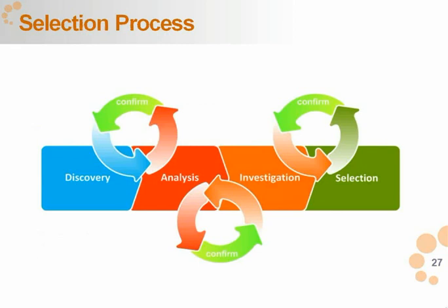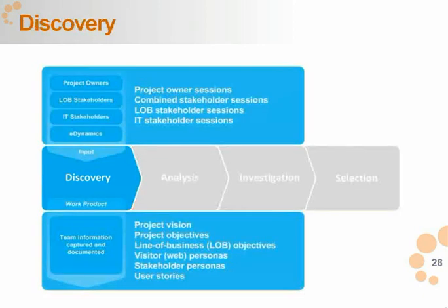In the discovery phase, what we find is that this is where we actually prepare for the rest of the phases. We identify the various stakeholders. We work with the lines of business within the organization. We begin to define the vision for the project, identify clear objectives through project charters, talk about internal use cases or scenarios, how people are going to be using the system, how they want the visitors and your customers to engage with the system. Define the stories around that.